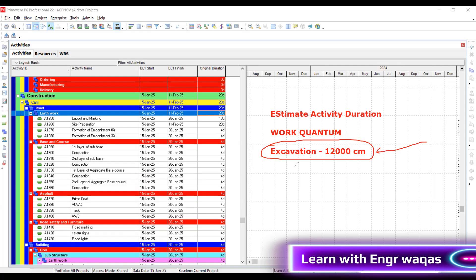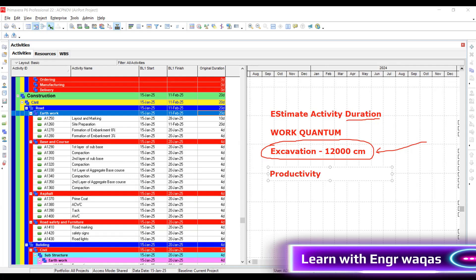Now you have to convert this work into man hours, that is the duration. From man hours you can convert into duration. So in the midway you need productivity. The definition of productivity is work done in unit time.